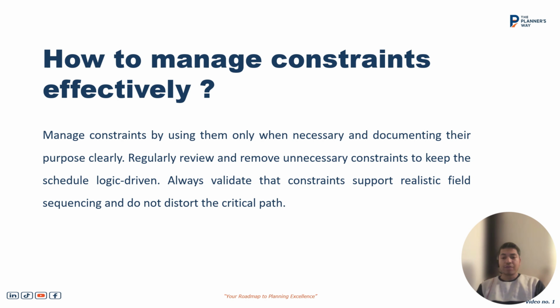And the third approach is validating the constraints with realistic field data, whether they are replicating the field or the contractual obligation dates or not. If those constraints are not replicating the field data or the practical scenario, they have the potential to distort the critical path, so we can take them out. And this way we can manage the constraints in any program.